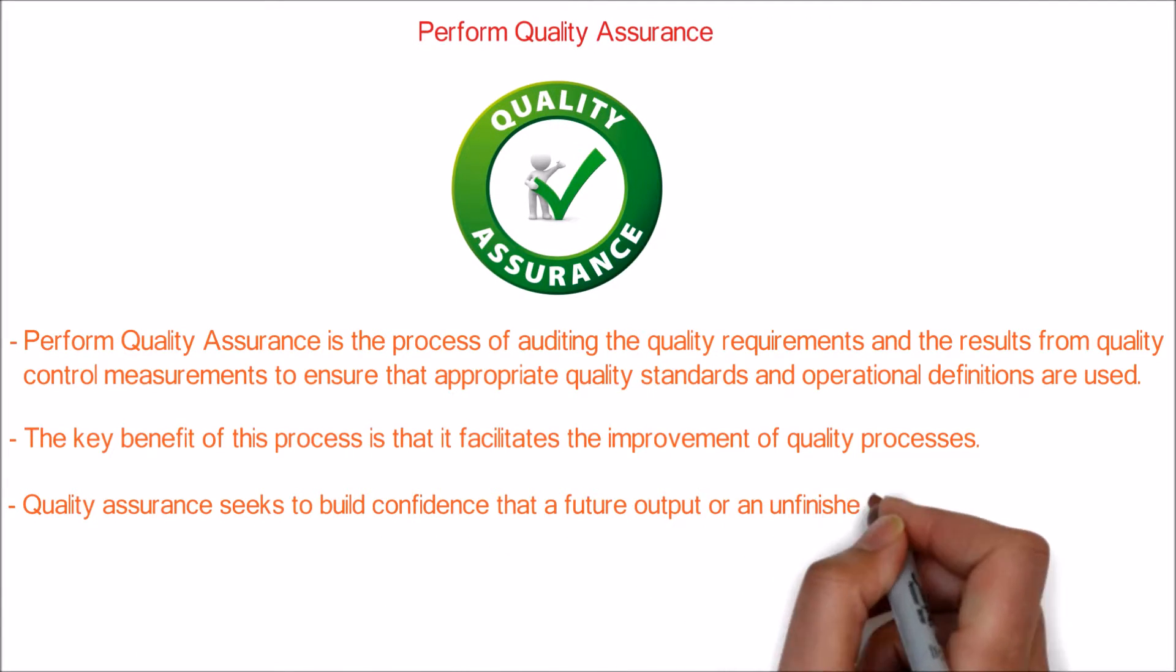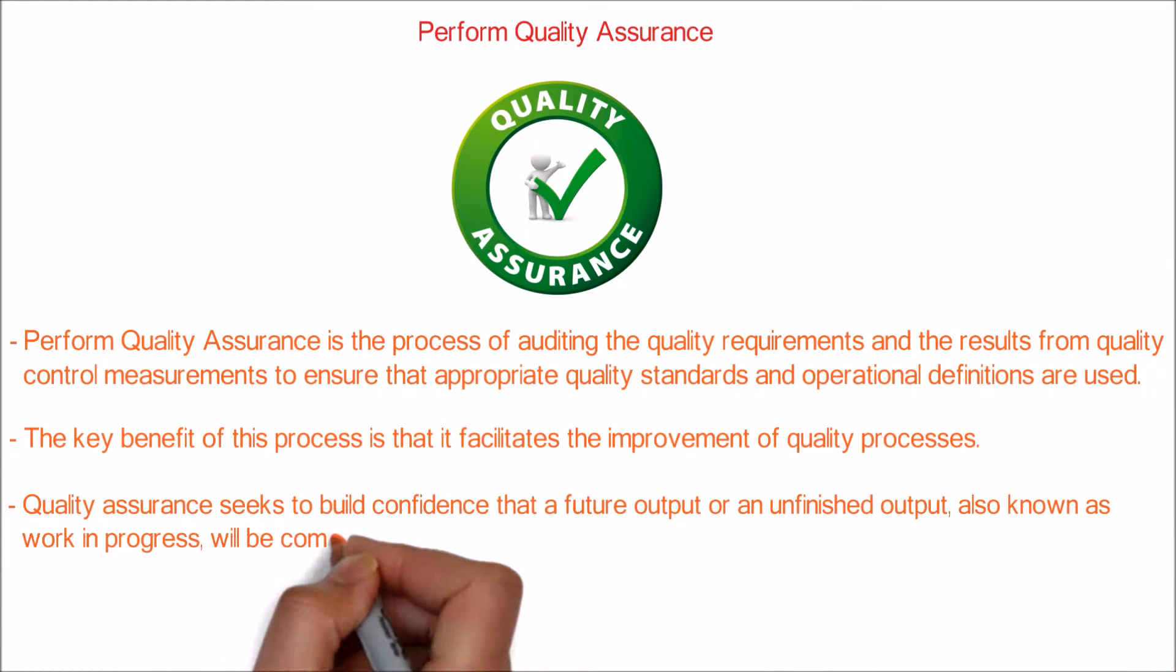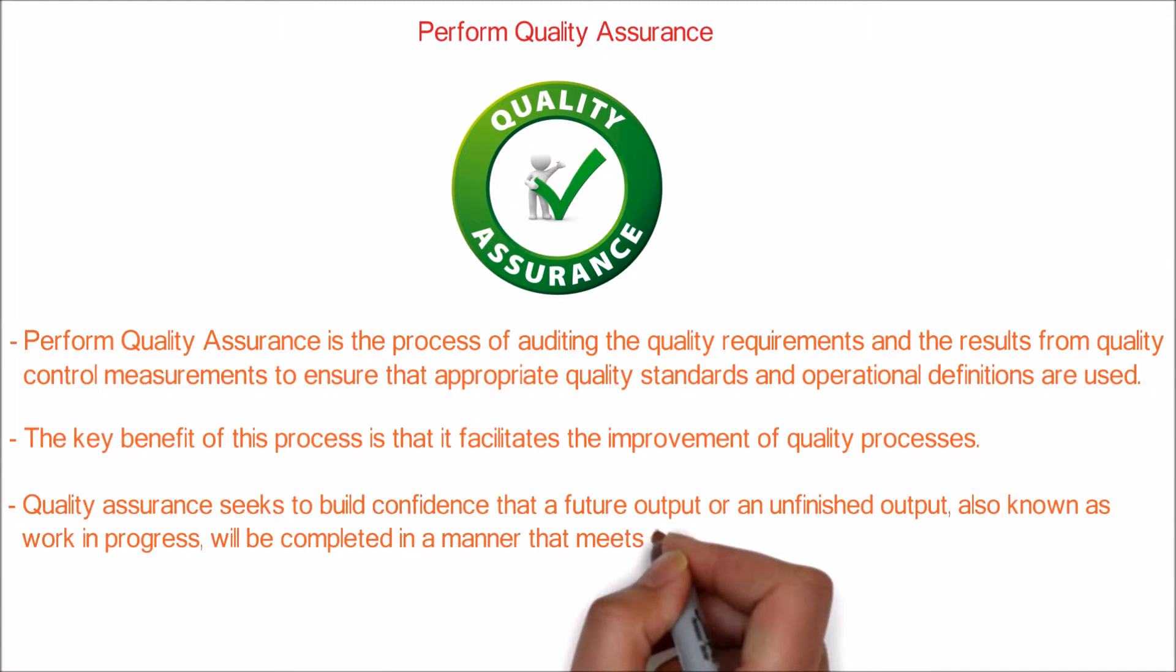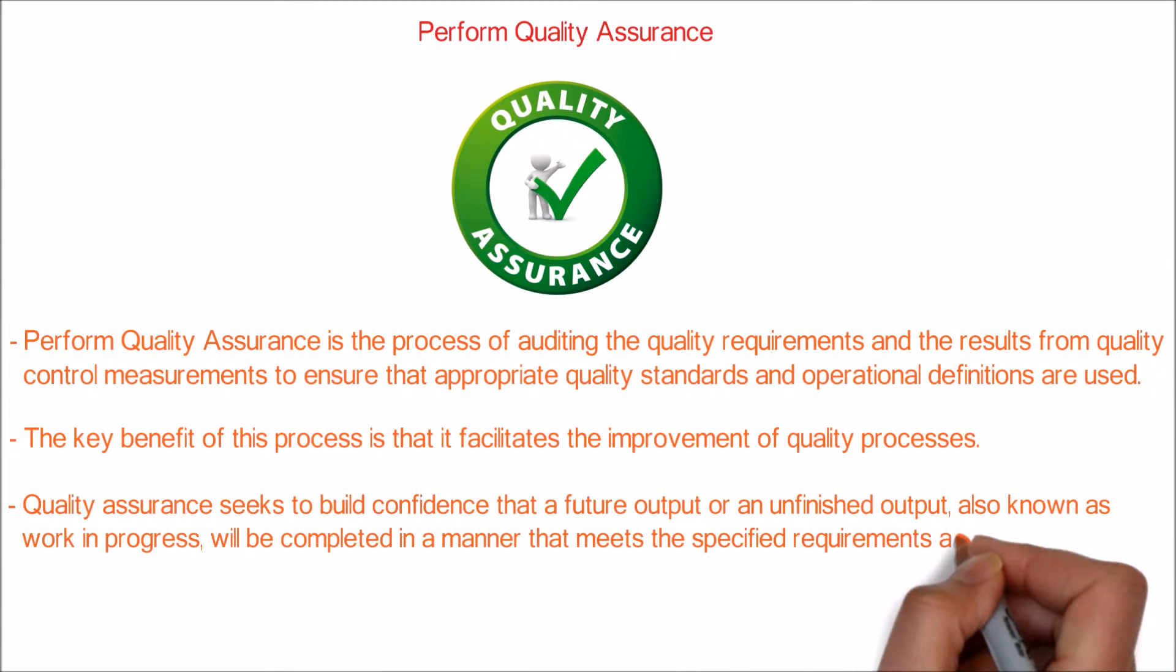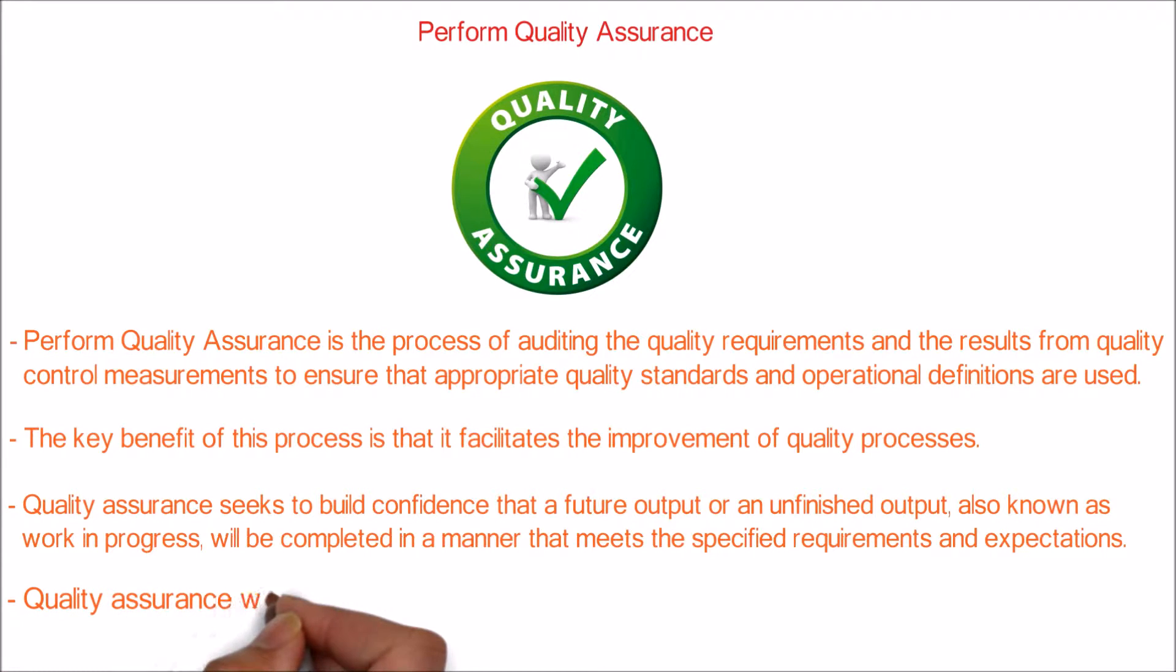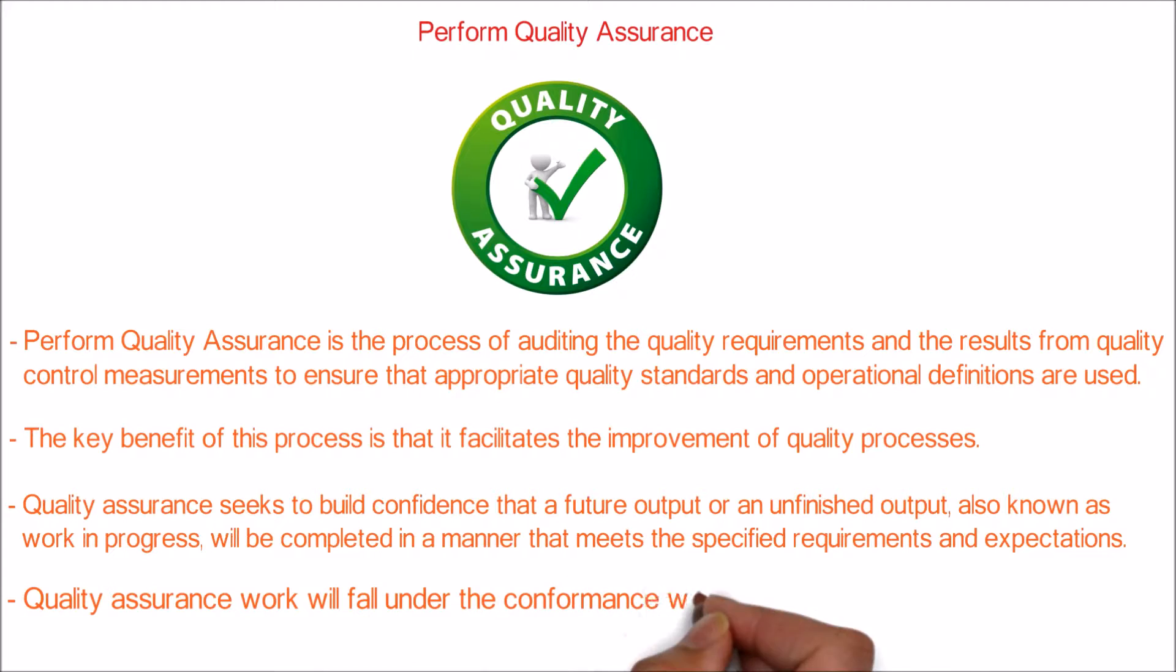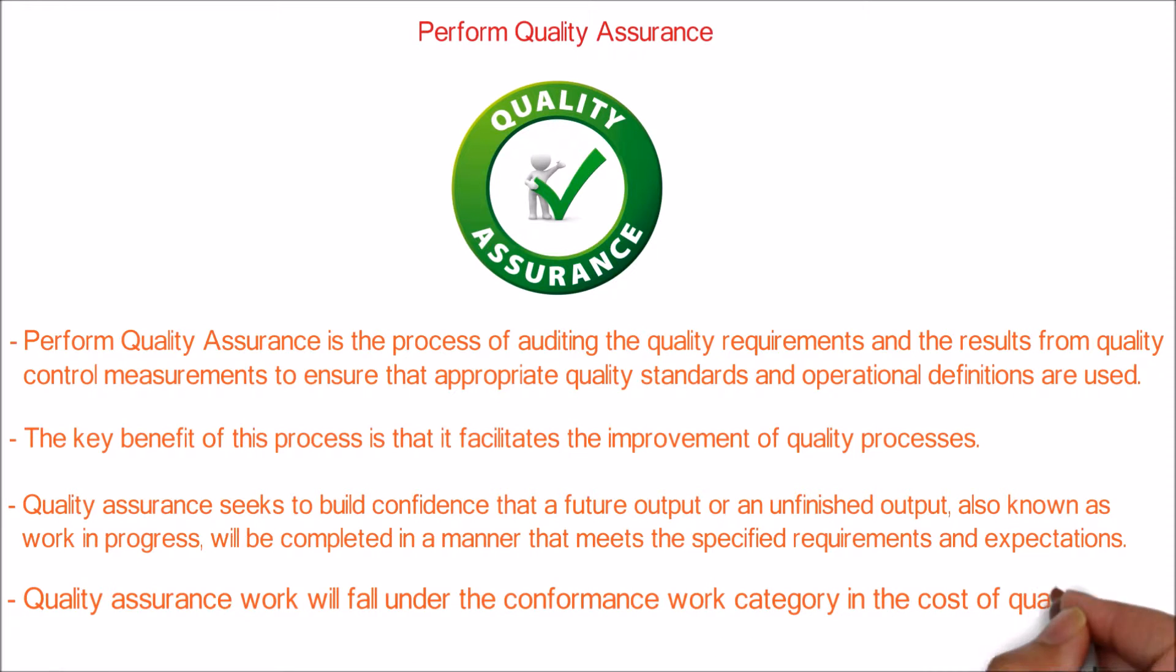Quality assurance work will fall under the conformance work category in the cost of quality framework.